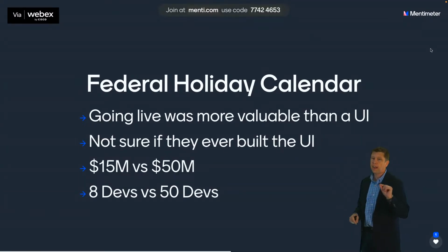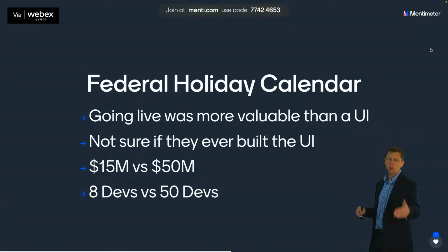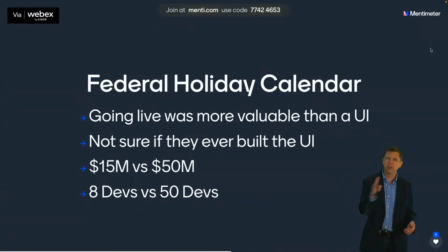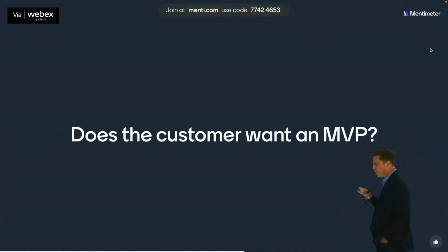Like this particular team, if they had gotten to the point that they were ready to go live with everything except for this calendar thing, they could have said, okay, we really want the calendar thing. Let's delay going live. But giving them that option was important. Without having that option, they couldn't choose both ways. If we had just built it at the very beginning, they wouldn't have had the option to go live without it. You can't ever take software that you created and exchange it for moving your go-live date on the calendar just because you want a different date. The only way to do it is to push it out, to delay working on those things. And that's what MVP helps you do.